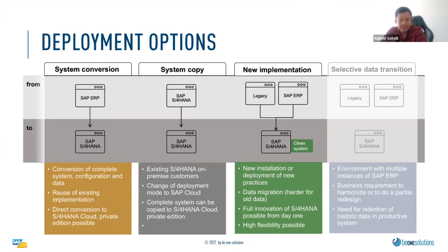You decide what you want. Because remember, guys, let's put the example. You have finance, and then you have all these sub-modules, right? General ledger, accounts payable, and that. So you can decide what you're going to move and when you're going to move, because you need to move, you need to test, and then you need to approve, right? So you can go live with that piece. But then you need to continue with everything, all the processes you have, and then start moving them one by one. So you have everything in place. That's exactly it. Thank you, Gabriel.